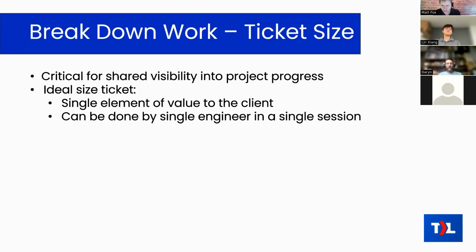We do have a pretty strong recommendation though that any single ticket should never be more than 2 days of work, so 15, 16 hours or so. If you're planning out your work and you set up a ticket, and you'll put a budget on it, I'll talk about that in a moment. When you put your budget on it and you're like, wow, this is actually probably a 30-hour ticket, no, split that up into something smaller, at least 2 other tickets, to get that down to a reasonable size.